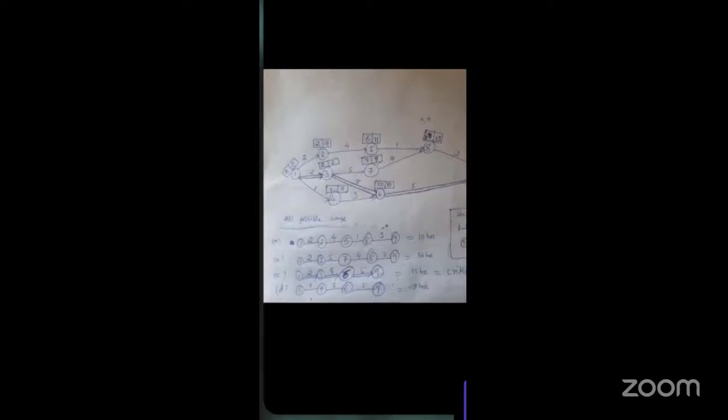Before filling all the LST, LFT, EST, EFT, we have to first finish the critical path activity and event values. In the critical path, the events are 1, 3, 6, 9. So first we have to fill the values for this route.